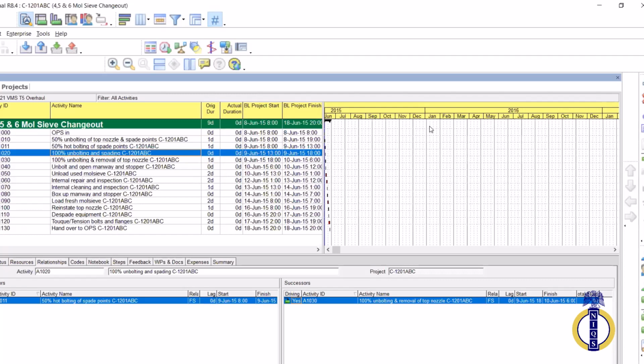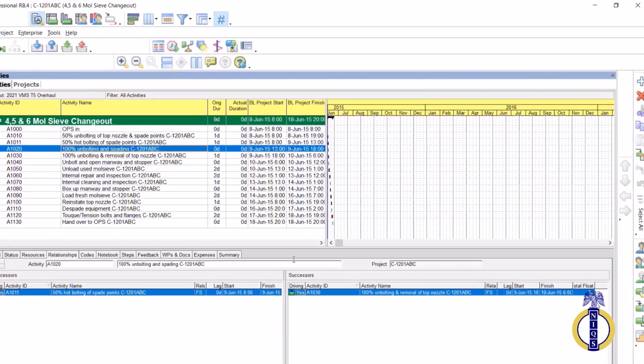So you wouldn't want to be doing that laborious work of daily reporting, especially with a schedule that has 15,000 or 20-something thousand activities. For projects that are spanning that long duration, you can make the duration, but it should be contractual. It should be based on what the contract says. What is the regime of your reporting?